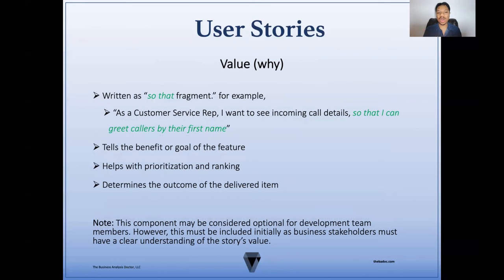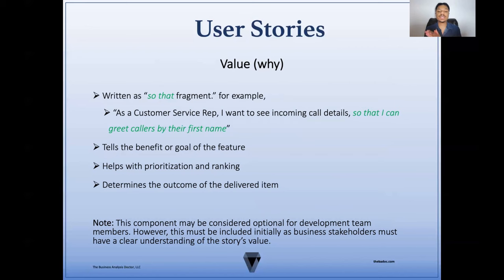Then we have our value, or why. This is typically written as a 'so that' fragment. For example, 'as a customer service rep, I want to see incoming call details so that I can greet callers by their first name.' This tells us the benefit or goal of the feature. It also helps with prioritization and ranking and determines the outcome of the delivered item. This component may be considered optional for the development team members only; however, it must be included initially as business stakeholders must have a clear understanding of the value of each story.